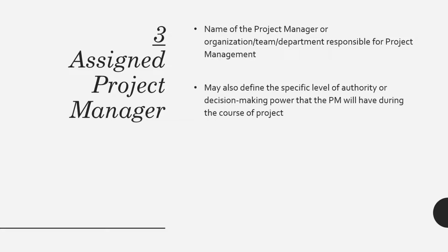And it's not just about making expenses. It could be about anything else, right? The project manager might have the authority to hire up to 20 resources, to fire up to 10 resources without being answerable to anyone. So those are the kind of authorities that a project manager might enjoy, and certain project charters are very explicit in easily and clearly pointing them out as well.